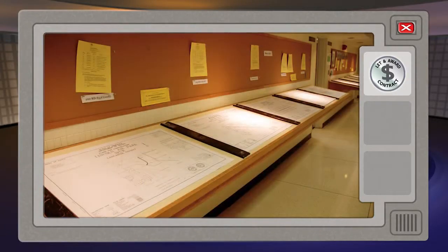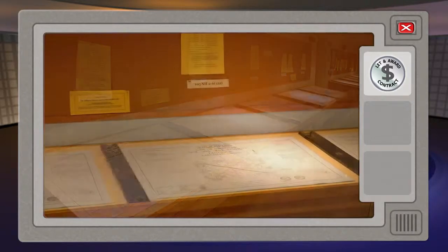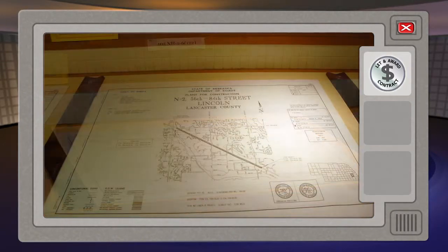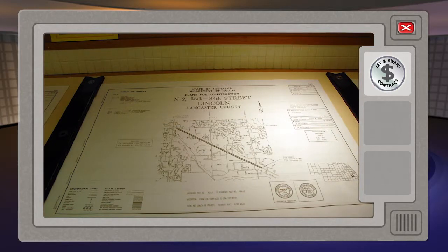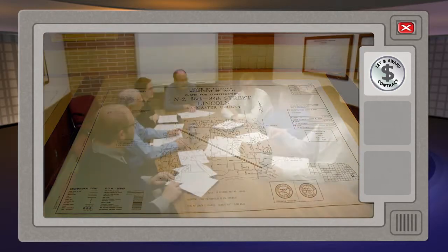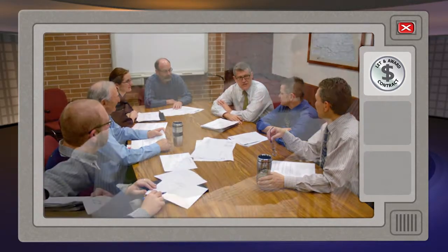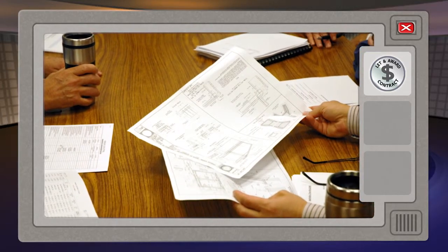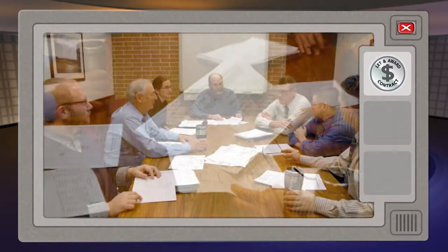The contracts section within the Construction Division will take all the information gathered and use it to produce a proposal for contract letting. A letting is a procedure that allows for contractors to bid on the project proposals that are ready for construction. An awards committee, comprised of the division engineers for construction, materials and research, and the 2 deputy directors for the Nebraska Department of Roads, review the bids and recommend whether or not a project should be awarded based on the required criteria and how close it comes to the letting estimate.